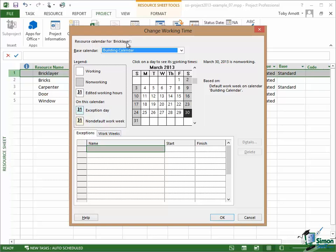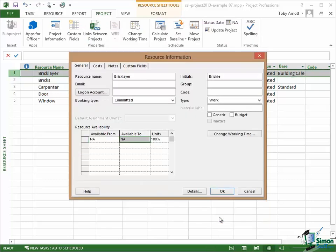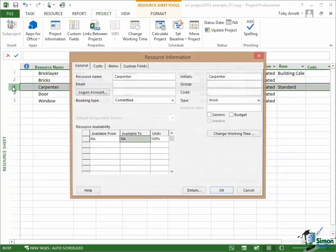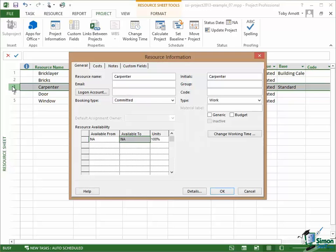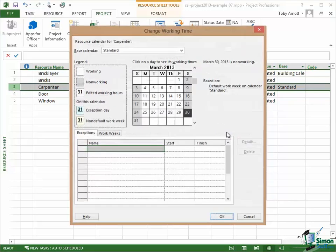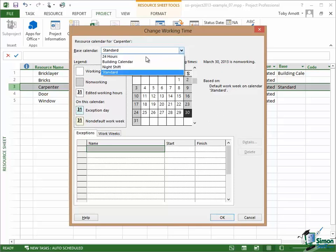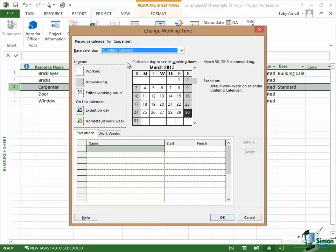So for the Bricklayer, the default working week is the one on the building calendar. So click on OK. That will have now corrected the working time for Bricklayer. And then if I do the same for the carpenter who's my other work resource, again click on Change Working Time and his calendar is based on the building calendar as well.